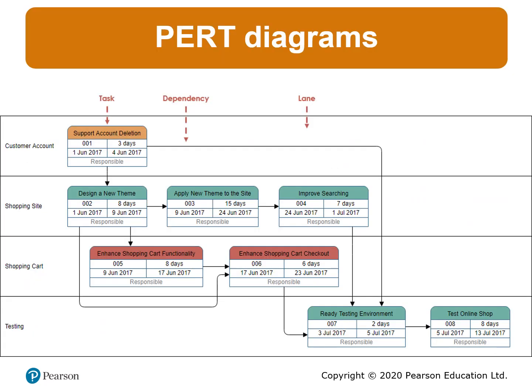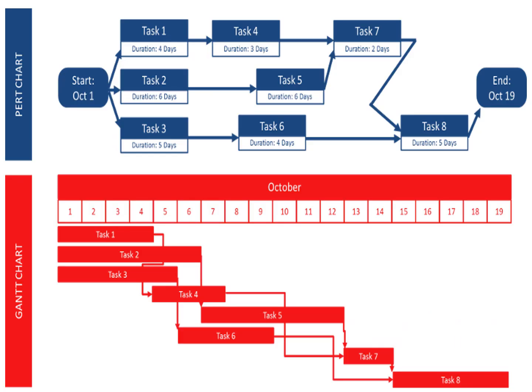PERT diagrams explain tasks, dependencies, and swim lanes. For example, we have a customer account lane, a shipping side, a shipping chart card, and testing — all parallel activities done at the same time. Each activity shows duration, start and finish dates, and can include the responsible person. Another example shows more parallel transactions throughout the project, whereas the Gantt chart mainly shows the same task's timing, duration, and responsibility.